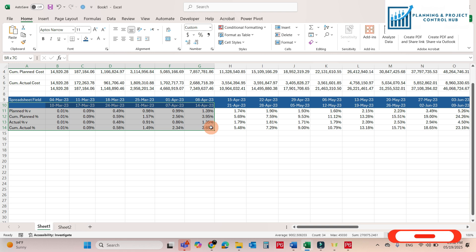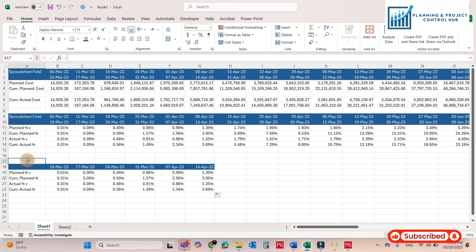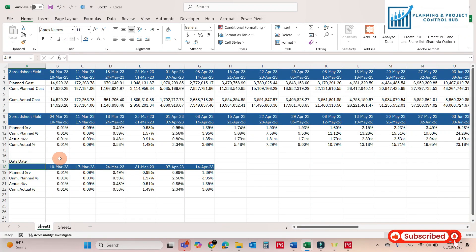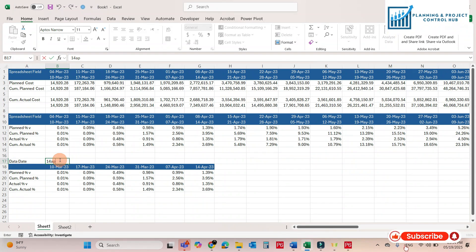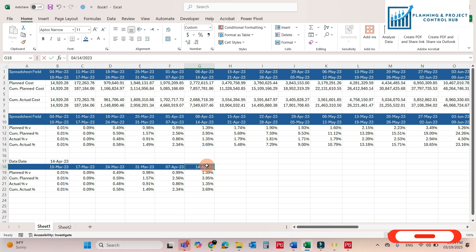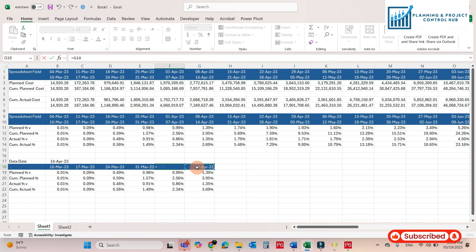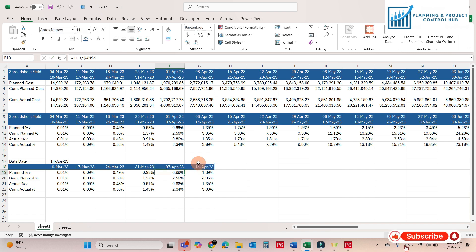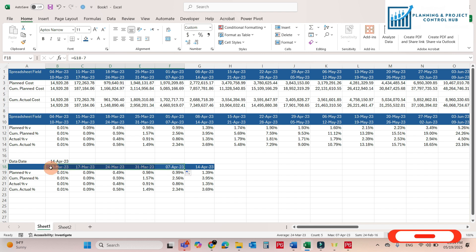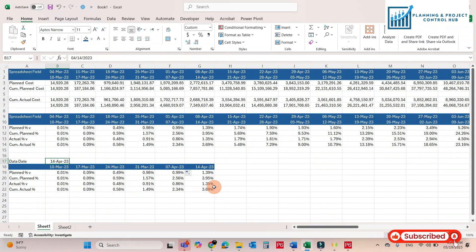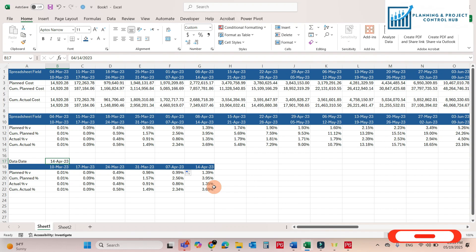For the dynamic S-curve we will take a reference table here. I will show you how to make it — just follow my steps. Take this data up to six weeks and paste it here. Now leave a Data Date cell. For example, write here 14 April 2023. All the other dates should be equal to this date minus seven. Now we link all the data together, because in future whenever we change this date the whole data will change dynamically. We will fill this using the INDEX formula — because when we make a change in the data date, by the power of the INDEX formula everything will be changed dynamically.